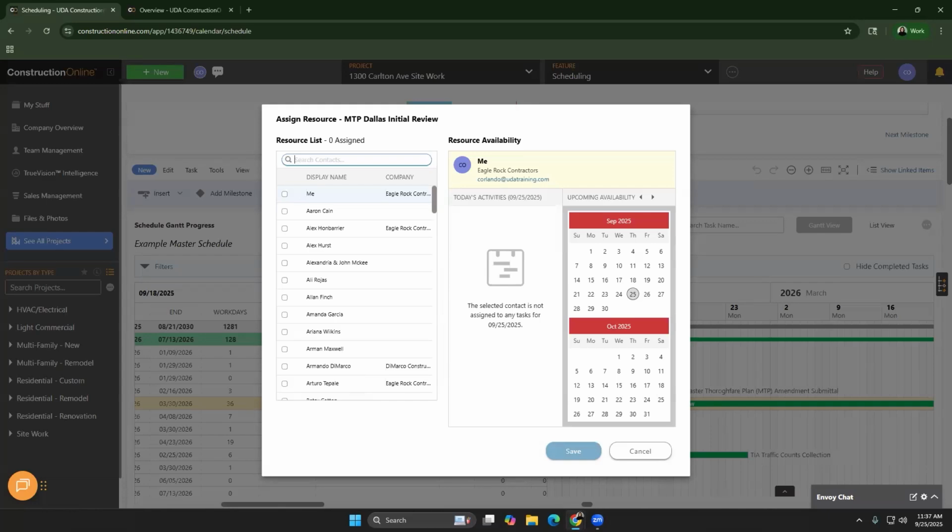Another question we've gotten: we often have delays with a particular trade that does not make all work on a site on a non-work day. Will a particular trade delay only affect tasks with a delayed task as the predecessor? So, complicated question, but breaking that down. When you have problems with a particular trade that is not making all work on a non-work day, you can go in and customize those work days to make work day exceptions. So if they need to make it up, you can always have them make it up. Additionally, you can always go in and create additional work days, like adding them on, like we talked about for the individual task, which may affect other ones with that as a predecessor, but that's usually the way that most people manage that.